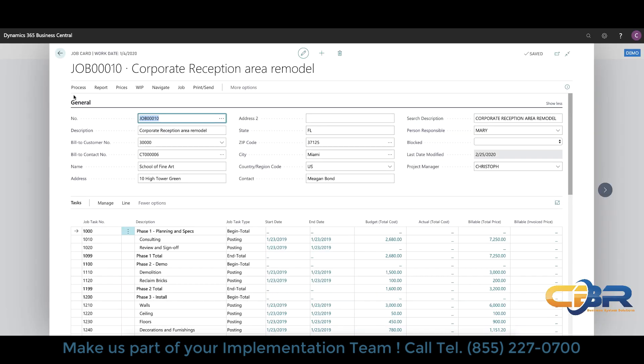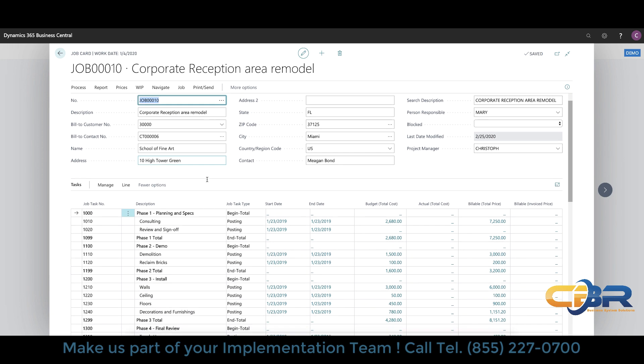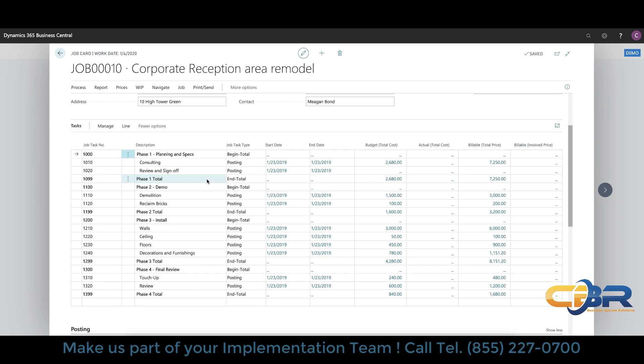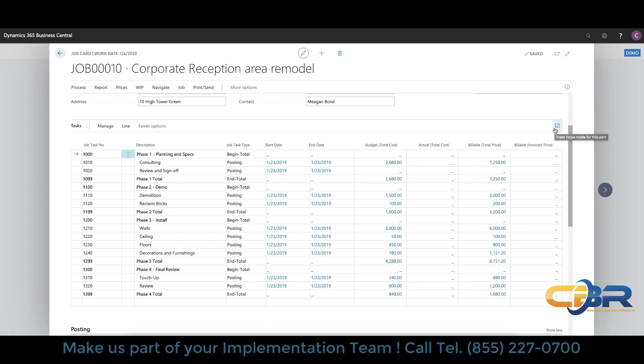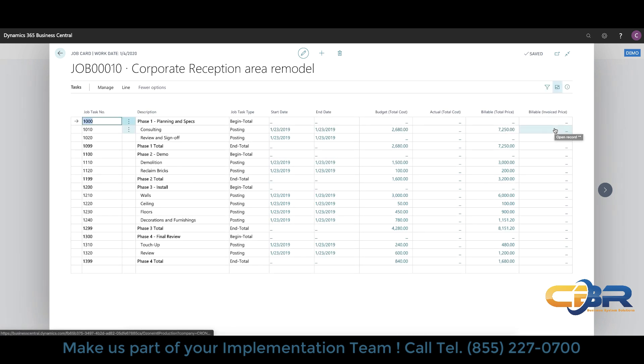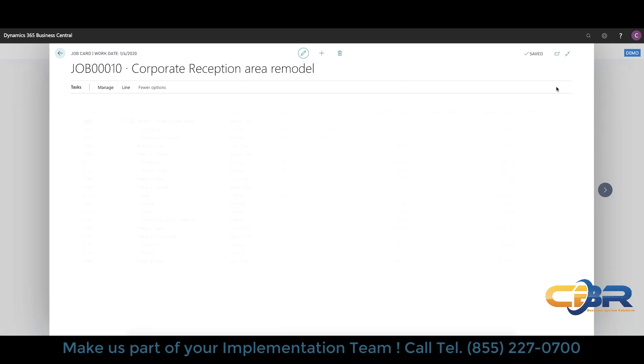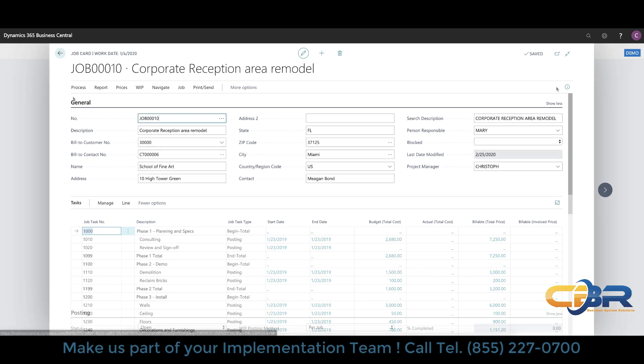Now after the header job header information you can also deal with individual lines or tasks so the job task number and job task line is referring to the individual items that are on the job itself. These jobs can be headers and footers just to logically organize things as well as actual action items that you can then record against using a posting type. There's obviously some timeline information here as well and then you can both budget costs as well as revenue in this configuration as well. To maximize the view of the lines you can hit this little box on the right hand side and it shows you nothing but line task job task line information as well. You can toggle in and out of that view quite nicely.